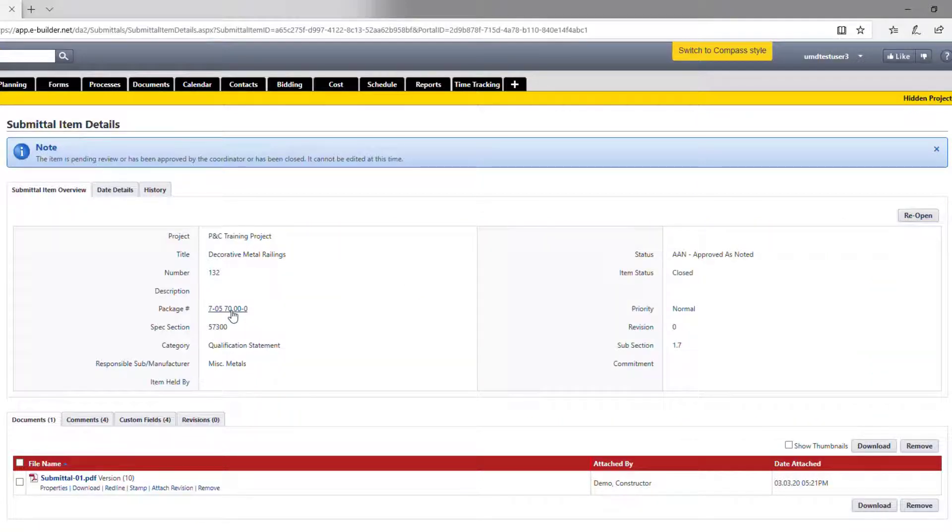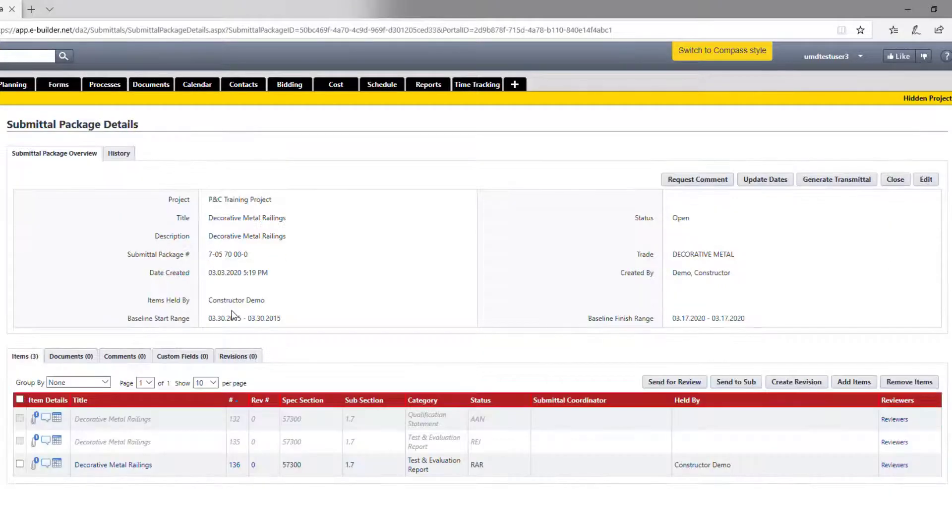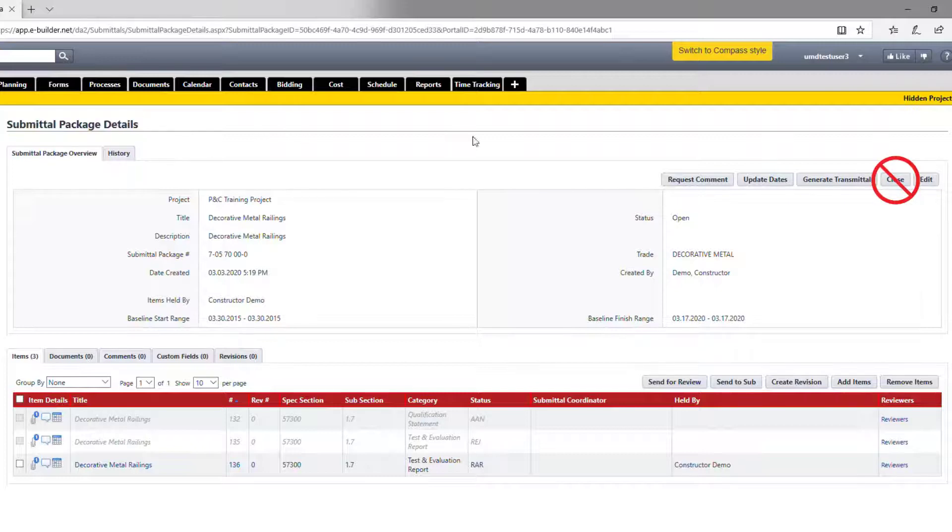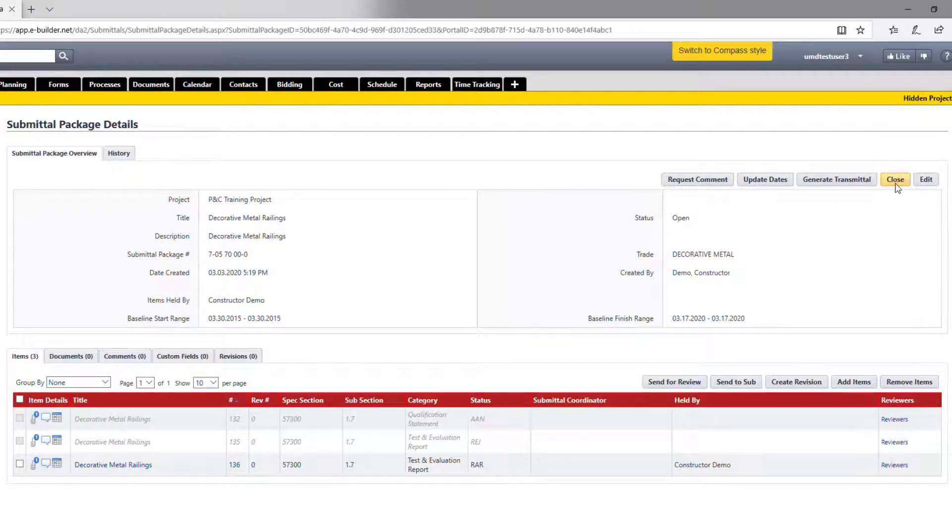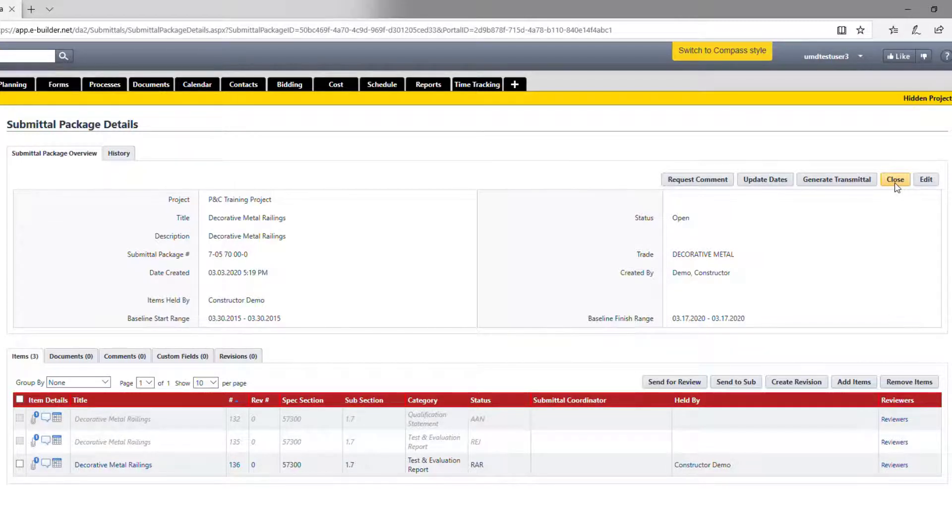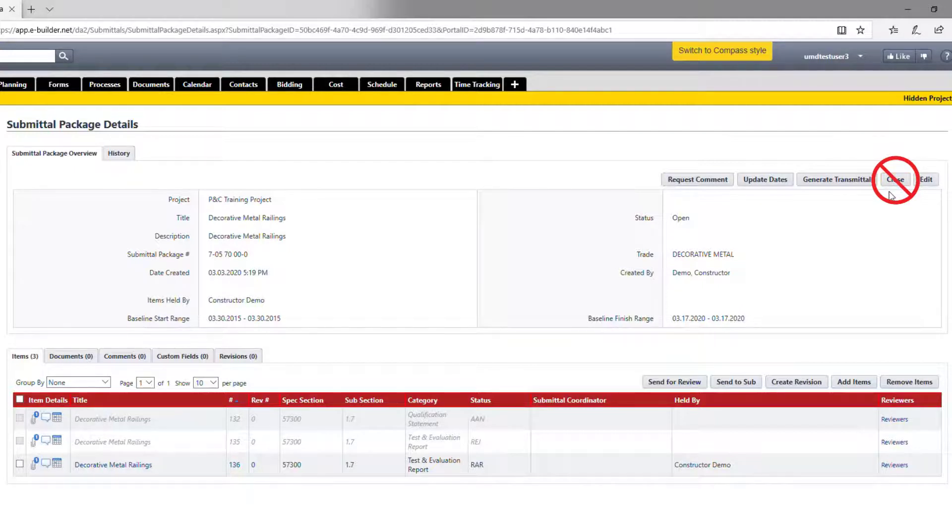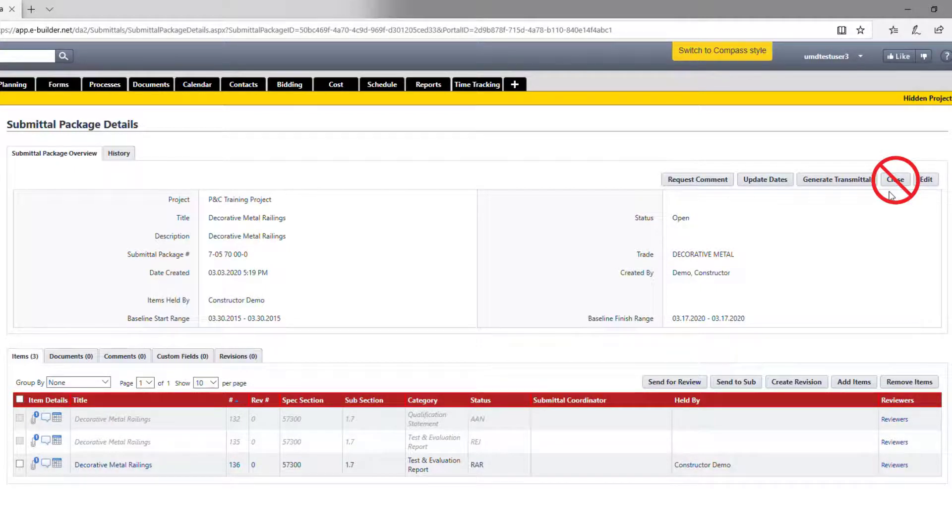By the way, you may have noticed there is also an option to close items from the package level right here. Please do not touch this button. In some cases, you may have multiple items that you need to close. It may make sense to close them all by one click here, but please do not do that. There is a known glitch in e-builder that may impact the closed items if you close from the package level. You need to avoid this until the fix is released and available.